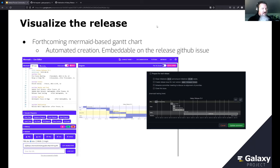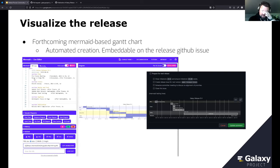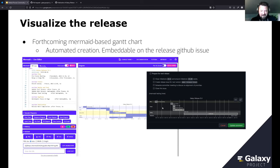Mermaid has a Gantt chart plugin that can automatically generate Gantt charts from plain text. You can embed it straight in GitHub. For the 23.1 release, we'll have this chart at the very top of the release issue, giving a visual picture of the scaffold — what blocks of time belong to what things, how it all flows, and what tasks are dependent on other tasks. It will be automatically generated.